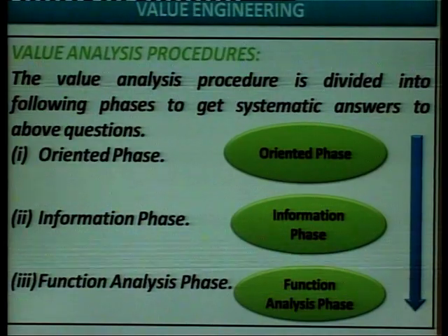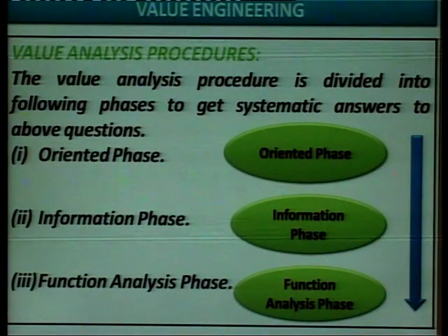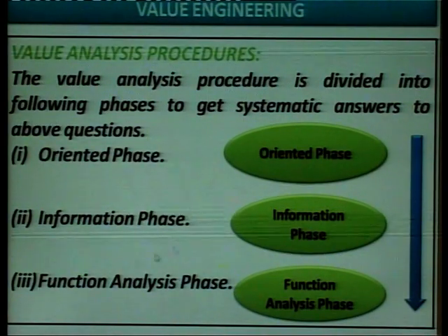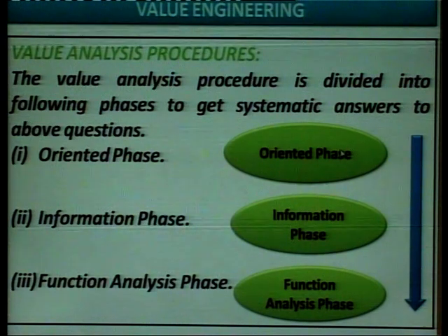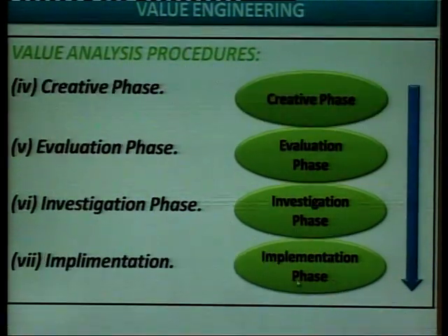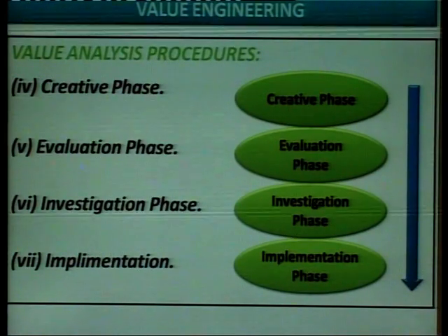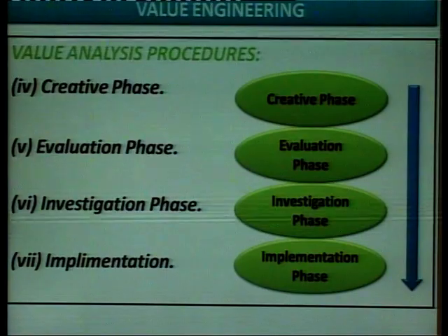The value analysis procedure is divided into the following phases to get systematic answers to the above questions. Number 1, orientation phase, then information phase, next one is function analysis phase, next is creative phase, evaluation phase, investigation phase, and last one is implementation phase.